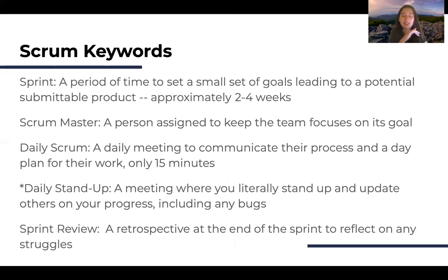Something that is a little bit different, but you'll probably also hear, is a daily stand-up. This is a meeting where you literally stand up and update others on your progress, any struggles you're having, and what you hope to get accomplished for the day. The reason it's called a daily stand-up is because you are physically standing up to ensure that the meeting will be as short as possible. If you're all sitting down, lounging in nice leather office chairs, you'll get a little comfy and not mind it too much. But if you're standing up, you're going to want to eventually sit down.